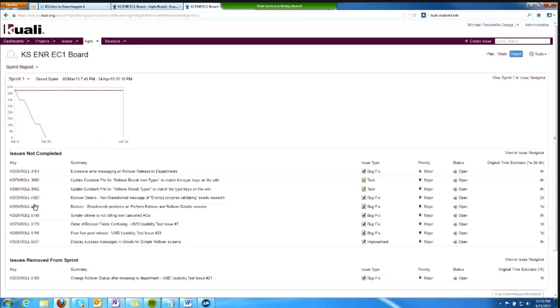It shows what was completed, what was not completed, and it also tells me about scope change. It shows issues that were removed from the sprint after the sprint was defined, and it would show me issues that were added to the sprint after the team defined its body of work during sprint planning and began the sprint.